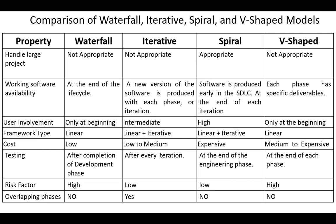Next, testing. In the waterfall model, testing is performed after completion of the development phase. In the iterative model, after every iteration. In spiral, at the end of the engineering phase. And in the V-shaped model, at the end of each phase.